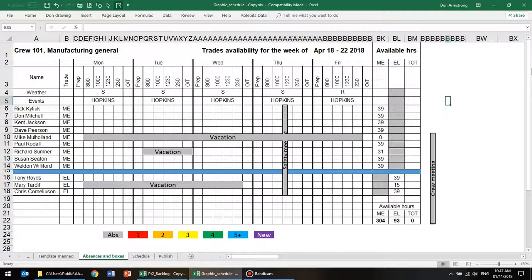And you might find that as the schedule fills up, you have to start scheduling some lower priority, smaller jobs just to effectively use all the hours in the week. And that's why the backlog list should show all the jobs in the backlog, not just the ones with priorities of up to 4, which is next week's work. Now let's take a look at the schedule template.